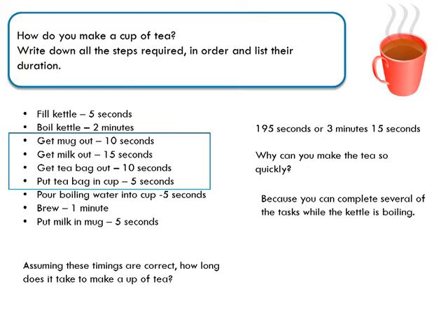And working these things out allows the business to identify the shortest possible time in which a project can be completed. And the critical path is the set of activities or tasks that will lengthen the duration of the project if they're delayed. For instance, if you forgot to switch the kettle on, it would mean it would take longer than this 3 minutes 15 seconds to actually make the cup of tea. So boiling the kettle is on the critical path.